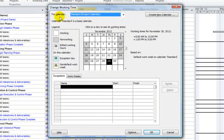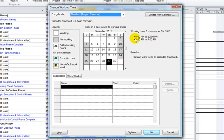In the For Calendar area, you'll see by default the current calendar assigned to the project. A calendar defines a set of working and non-working days and times. In this image, you'll notice the working days and the non-working days. If you had any exceptions, you would see that here as well. You'll also see the working times — in this example, 8 a.m. till noon, with an hour lunch break, and then from 1 to 5 are the working times.